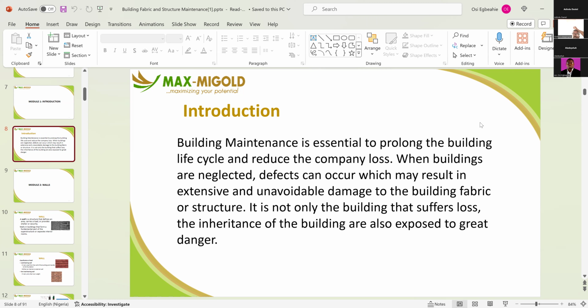That's why we always say that there's this part in building construction we call practical completion, where the building gets to a point where it becomes habitable, where the owners can move in. It doesn't look completely finished, but they can move in and the other touch-ups are done while the building is being occupied. That's what we call practical completion. Most buildings are occupied at that stage.